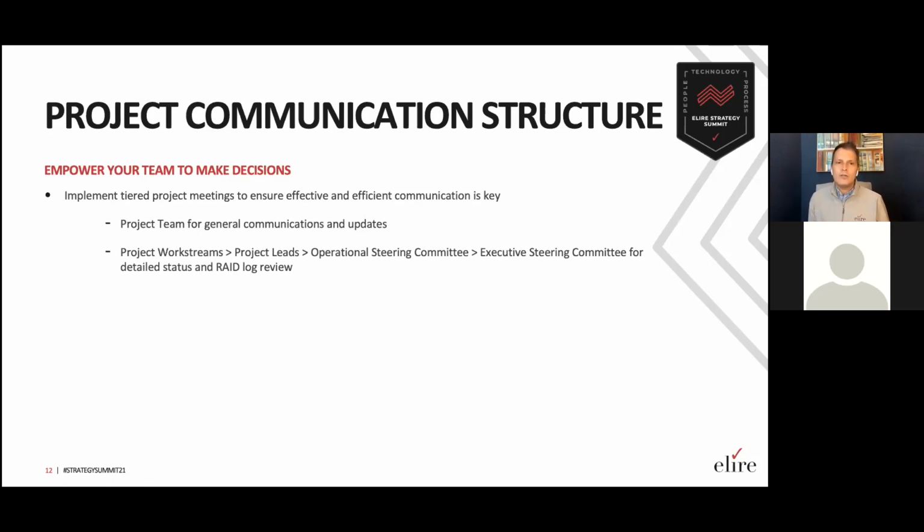But if you're not going to be reviewing all of that in these big project team meetings, if those are really for just the big communications about moving from one phase to the next or general project updates, when do you cover everything else? Well, we would argue that you do a series of tiered meetings. You organize your project by team or work stream, and those meet regularly. Then each of the leads of the work streams meet as part of a project leads meeting, and then you can have a series of steering committees.